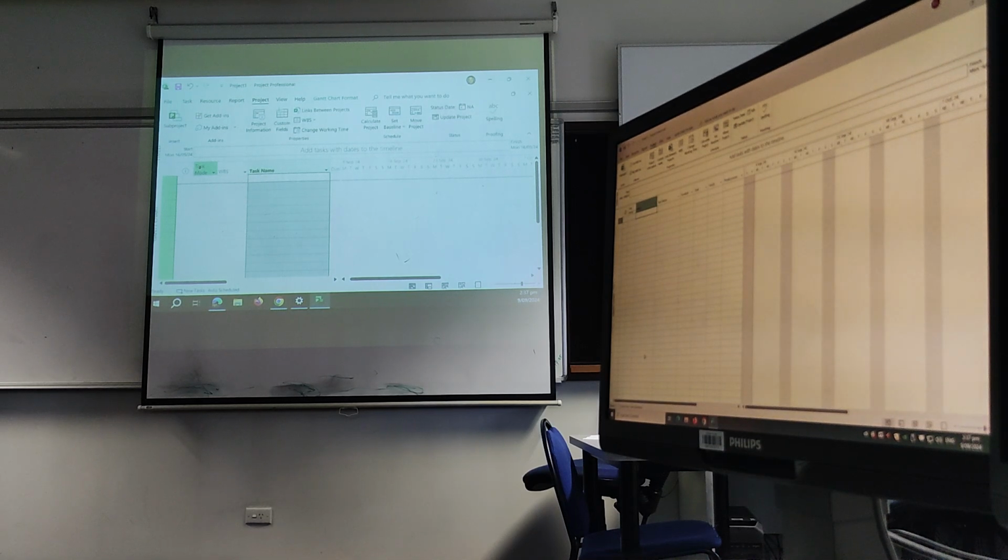So each time you're breaking it down, you're actually checking and saying, have I covered the whole scope of the project? What are the consequences of missing something out? If you say, miss the curb and channel. You haven't included it in your Gantt chart, so you haven't included the time required to do it.